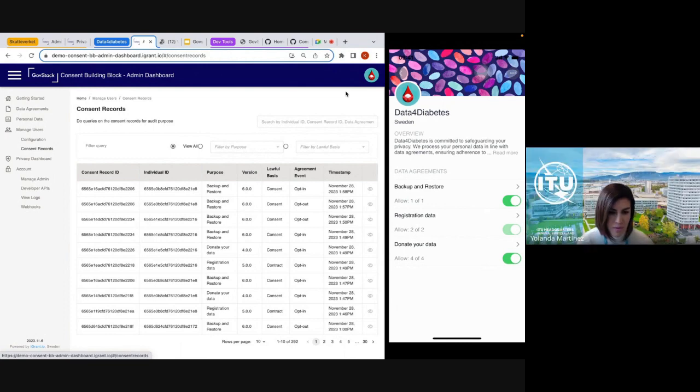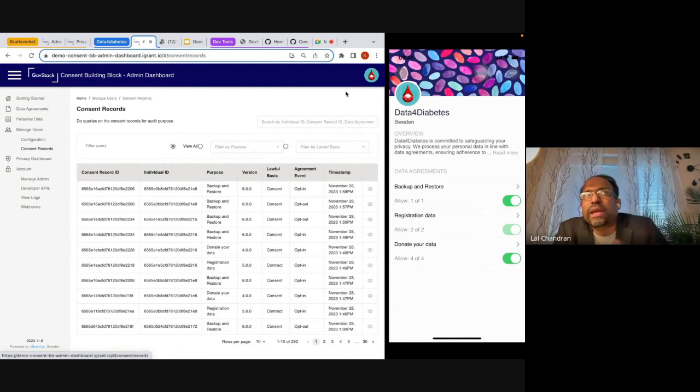Okay, thank you. At the same time, Yolanda, the way we have architected it, it's a microservice, and as long as the endpoints are integrated and working, it doesn't matter where the service is running. So I see very little risk in this approach. We have formulated a 3-step approach. Step 1 is to replace the APIs currently used in UCSD with our API. Step 2 is to replace it with a microservice that is up and running in our demo environment. Step 3 is the sandbox environment. That's how we have formulated it, and that's also to align with the work plan that we have created.